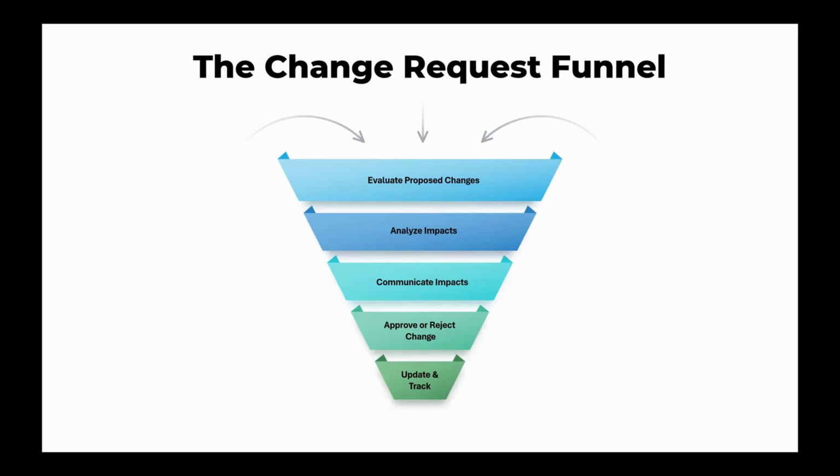If you're able to communicate the change, gain buy-in from the people, and the team is on board, at that point, you can seek approval from leadership. Once the change is made, track it to ensure the change has the intended impacts, and you should be good to go.